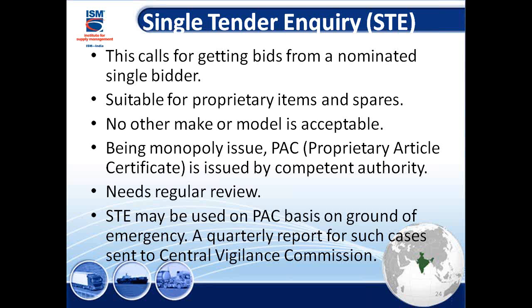But sometimes there are emergencies. In that case also I can use a PSC approach, a proprietary approach. I could go to the single tender and get the business done. But in such cases, you are supposed to send a quarterly report to the Central Vigilance Commission, CVC.